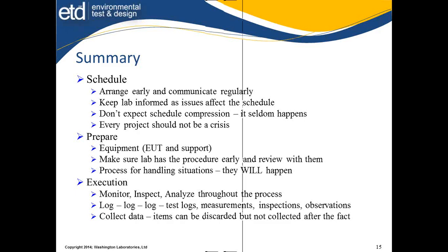Well, any communication should be addressed to somebody and others copied. If I address an email to five people, who acts on it? Nobody? Everybody? Some? You've got this arbitrary thing going on. I like to believe that we use some common sense, and if it's addressed to multiple people, the first name on the list should see that it happens. It may be the third name that actually needs to record it, but whoever's first needs to look at it and say, I need to make sure this got addressed, and see who does it.